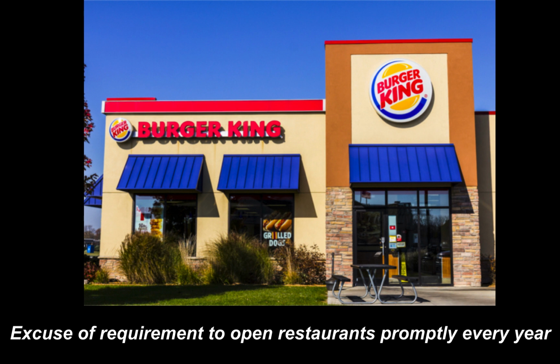For a while, Family Dining did a great job, opening the restaurants right on schedule. They encountered some delays in opening the 4th and 6th restaurants, even though they made their best efforts to get them open on time, and Burger King granted them extensions. The 5th, 7th, and 8th restaurants were open on schedule as well, and then they had further delays with the 9th and the 10th restaurant. Burger King gave them a really hard time about this and wanted to stop providing an exclusivity clause, stop giving them the exclusive territory, claiming that they failed to fulfill the condition. They didn't open the 9th and 10th restaurant on time.